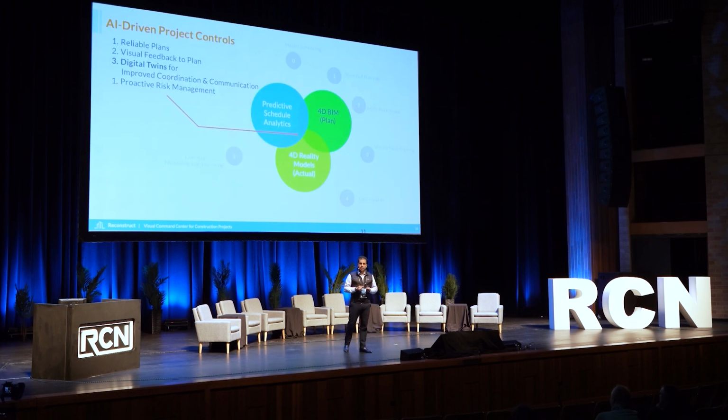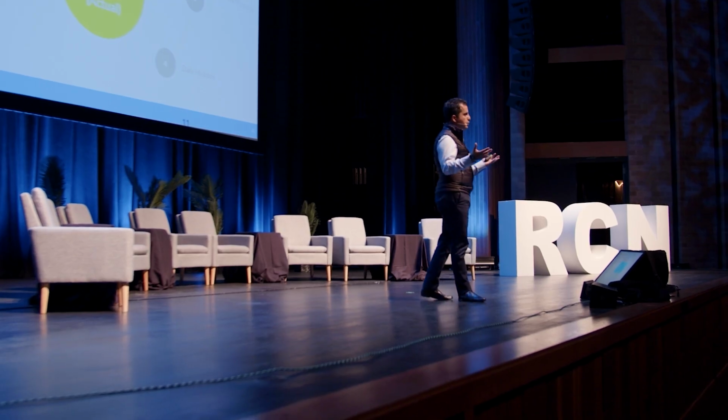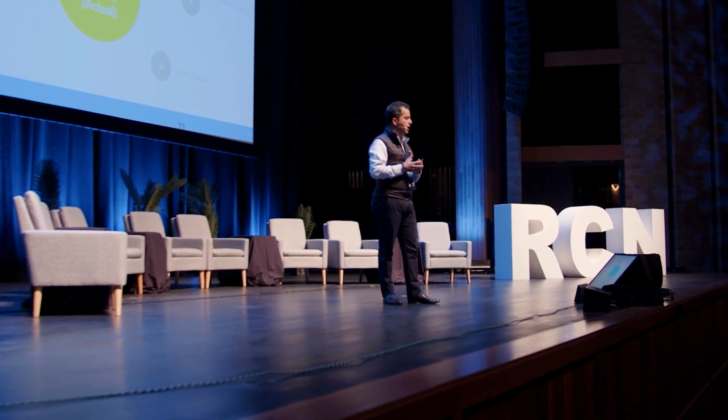So if I can achieve this type of integration, one integrated environment where you can see the reality against the design, or what is there versus what should be there, how do we use that as a basis for solving that planning problem? Now you can call it a project controls workflow that has been driven by AI, artificial intelligence. Why? We are taking advantage of the design plus a schedule to create a more reliable plan. If you can generate measurable experiences from your images and videos, over time you're generating reality models, so you can call them a 4D reality model, the fourth dimension being time.